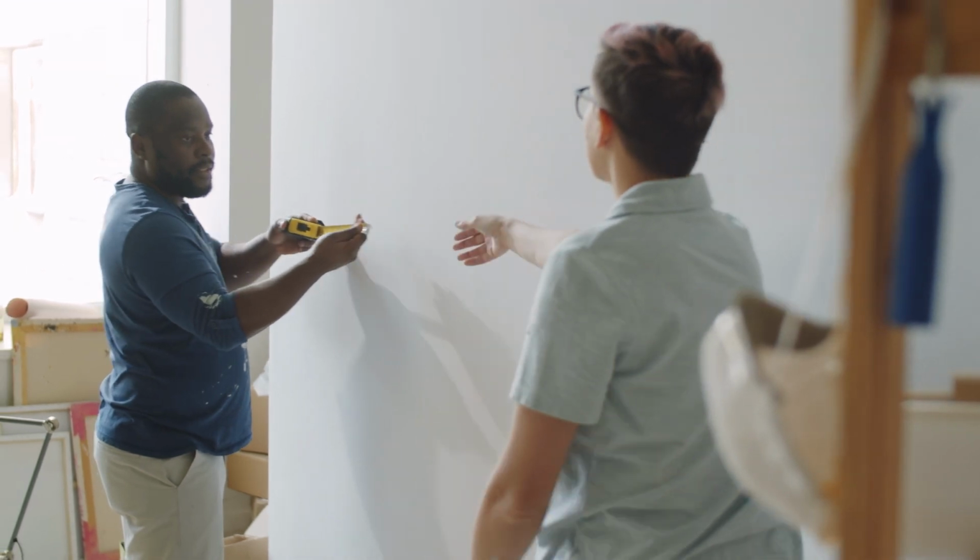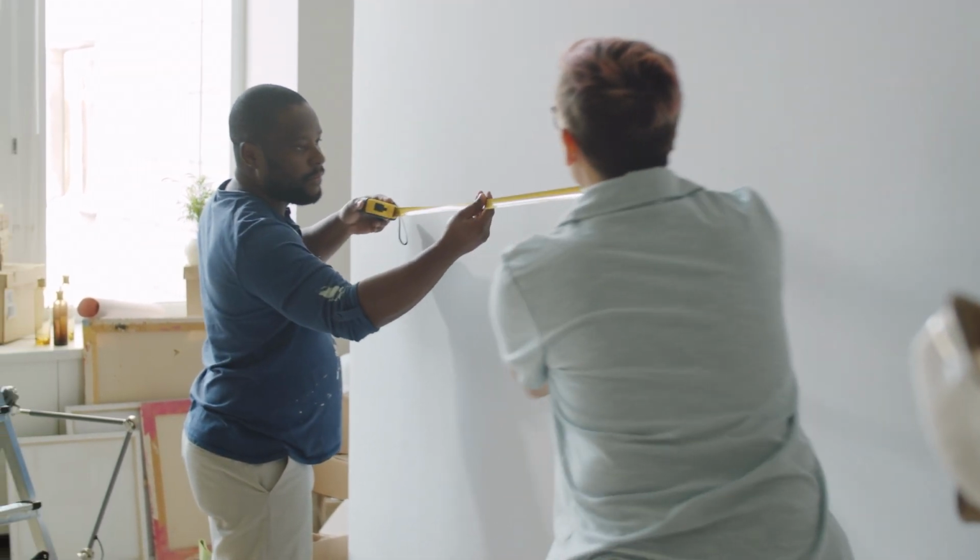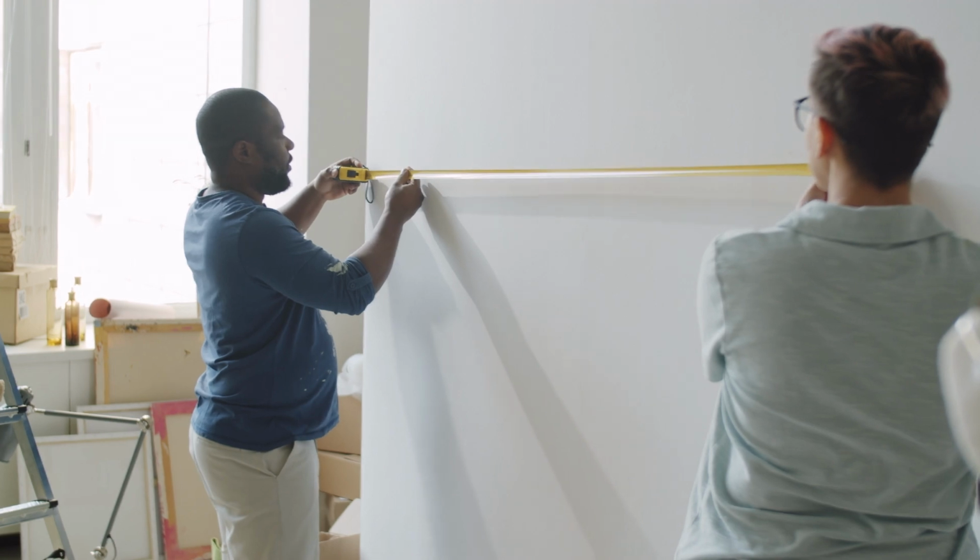Whether you get a consult or not, you'll need to get your home measured. I think it's worth paying to get this done professionally. This typically costs somewhere between $500 to $1,000, depending on the size of your home. What you want to end up with are the full drawings of your home's interiors, or exteriors too, if you plan on doing a major reno.